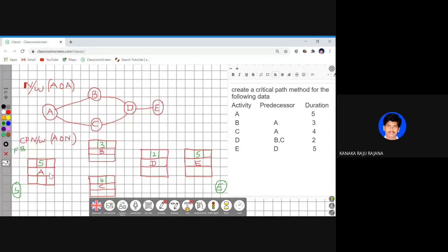So we are going to initialize the start of the project with early start value as 0, whatever may be your project. Do remember that early start of your respective project will always be 0. Early finish depends on the respective mode of your operation. Is this clear? Please message me in the message box. Any more doubts up to this? Okay, fine.